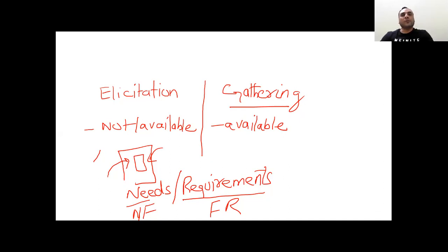So we don't know if he's asking for functional requirements or non-functional requirements. Once after listening to his story or gathering the data, I have to compare his data with the business case, to see whether this requirement achieves the business objectives or not. If it does not, then I have to discuss more with him why he wants it, because it does not match with the business objectives of the project.